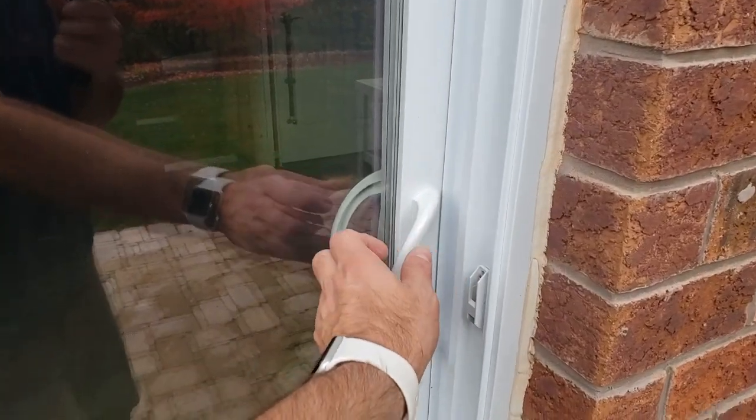Now, in no specific order, when I start walking through the basement, probably the first thing I'm thinking is, how am I getting materials in? Am I walking these down the stairs, through the house, in, and so I'm going to have to cover floors and protect things? Or can I fit most of the stuff through the window? Is there a big enough window for me to get drywall through? Or is this a walkout basement and we can just simply go through the backyard and just hand bomb all the materials in and not have to worry about going through the house or keeping anything clean?